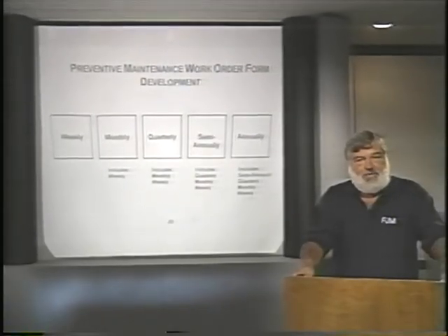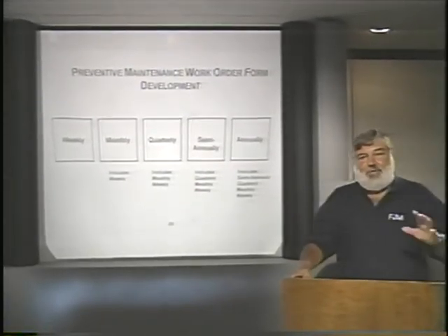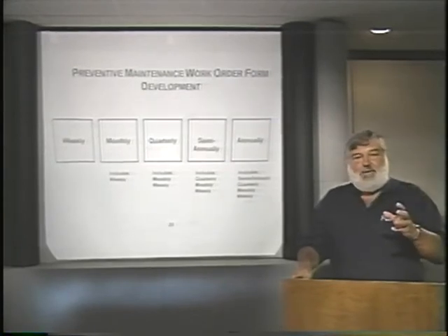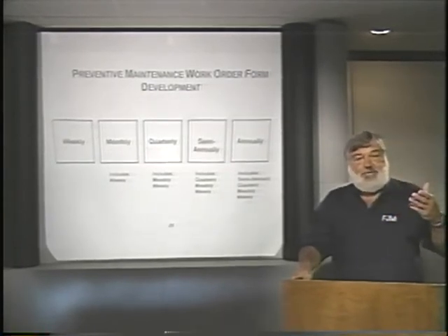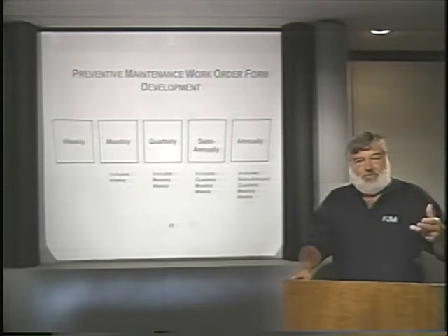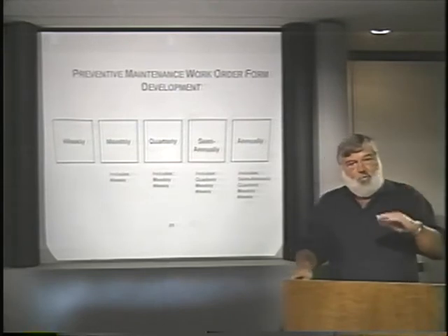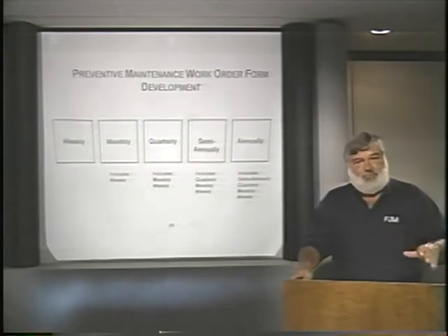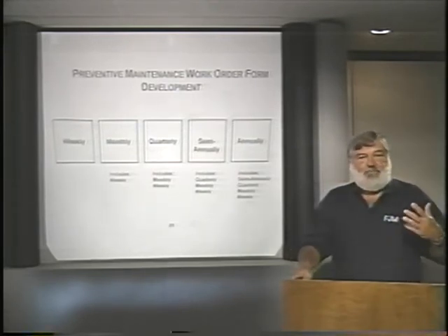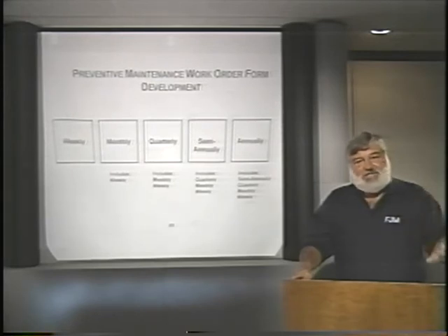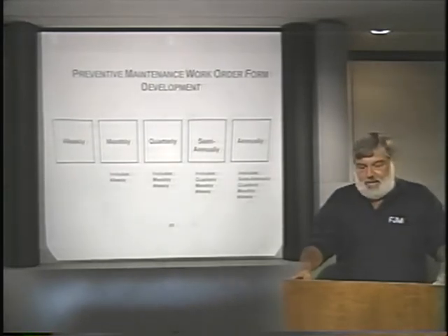And those activities would actually be incorporated into the preparation time, the travel to the job site. Then I would list all of the PM requirements for weekly, monthly, and quarterly. Then I would have travel from the job site, and if there was this contingency for delay, that would likewise be recorded.